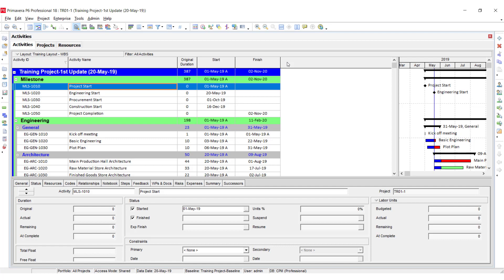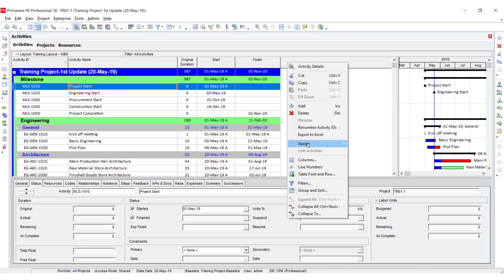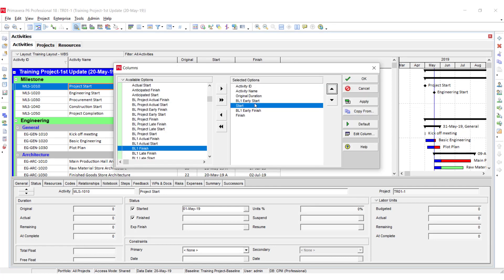I am going to add some columns. Go to the Columns option and add the baseline-related columns. After that you can apply and see the comparison between the baseline and the actual progress update.